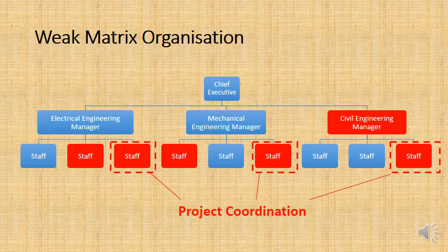They may commit to themselves to working 30 hours a week on the project and 10 hours a week on their other responsibilities. But if the mechanical engineering manager speaks to one of the guys in red underneath him and says, actually, I need you to be working 30 hours a week on these other projects, suddenly there's going to be a breakdown in communication. You are reporting to people outside of the project who do not have the same goals of achieving the project at a good cost, time and quality.